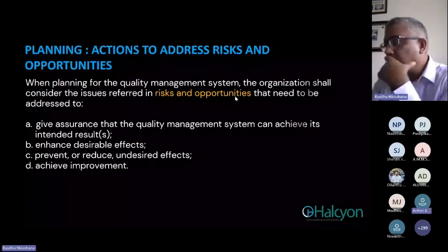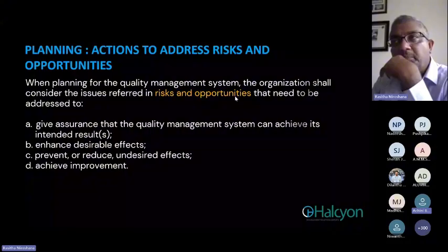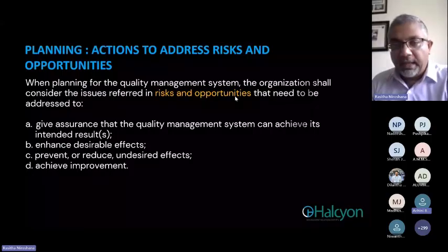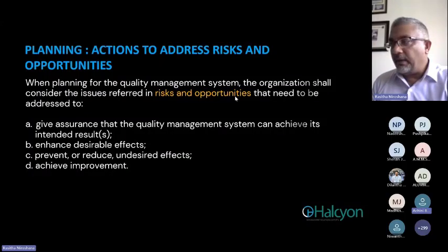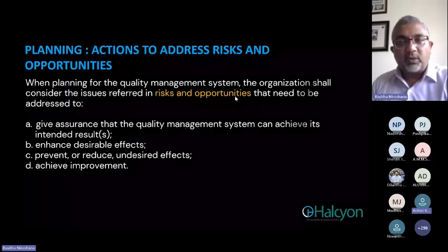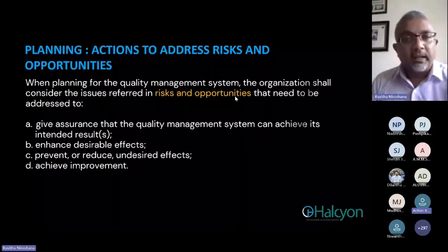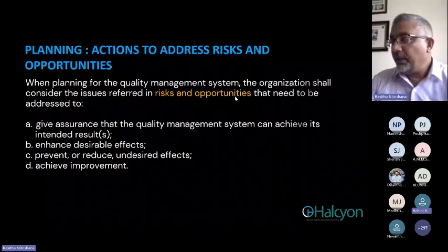Now, somebody has mentioned university strategic partnerships. Peradeniya University, right now, how many strategic partnerships do you have? Maybe you can develop an action plan. Okay, we are the food and technology unit. We need to set strategic partnerships with this scope. By the end of the year, we need to have at least another 10 universities or another 10 business units as strategic partners. So that's the action plan. There will be a person who's responsible for talking to the people, a person authorizing communication, then top management has to sign off. And what are the benefits you are getting? So this can be one of your action plans.